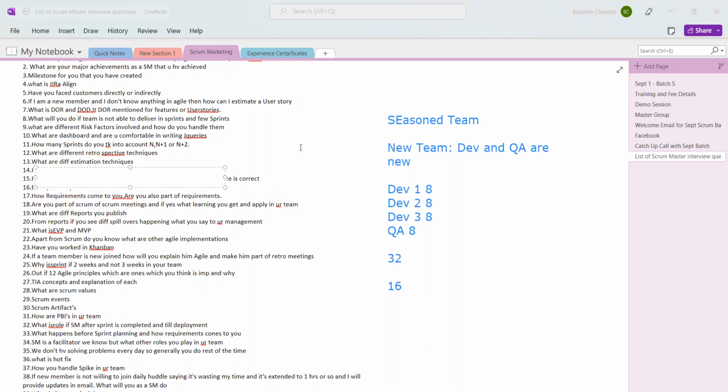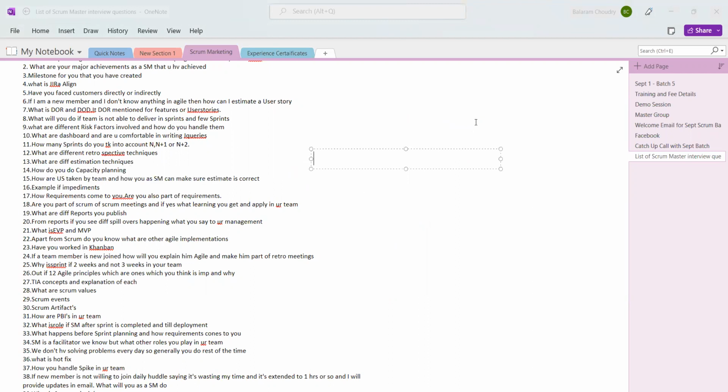So I was just hearing a few things in my team. When we are planning, ideally there is no discrimination between a developer and a QA. Although we call the entire team the development team, when you plan for capacity, we take the developers into account, right? There can be 8 members, but only 5 are from dev. In that case, we should only go with 40 story points, although you have 8 people in the team, because 5 are developers and 3 are QA. But when you're planning the capacity, is that the case?